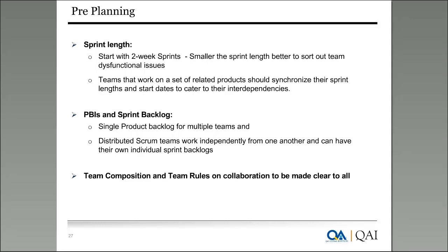Especially once all the teams are following Scrum, it is very important to synchronize not only the sprint length, but the starting date of the sprint as well as the end date of the sprint. At the most 1 or 2 days of a shift, so that the other teams can participate in the sprint planning and the sprint reviews. Apart from that, there should not be more shift in the start date, end date and sprint duration across different teams. It is very, very important.